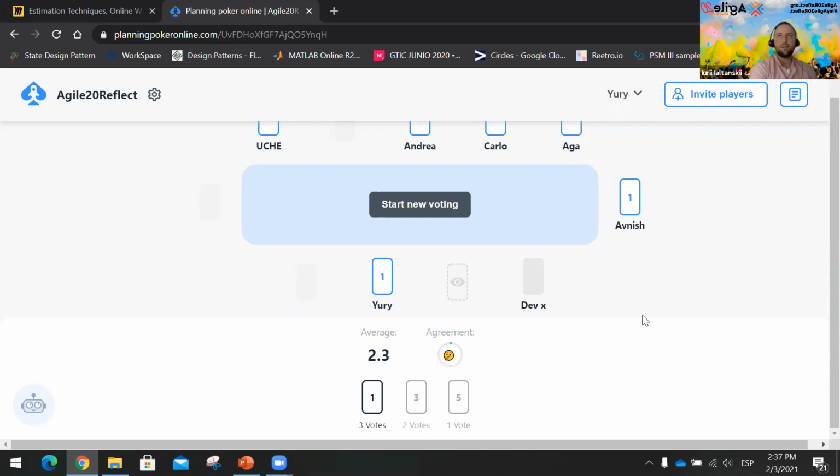We do not know too much about the product or the items, and we need to ask many questions to the product owner to understand whether we have acceptance criteria in place, whether we have a clear scenario for the particular functionality, and so on. So 5 to 10 minutes could easily be spent to estimate 1 item. But this is an example.